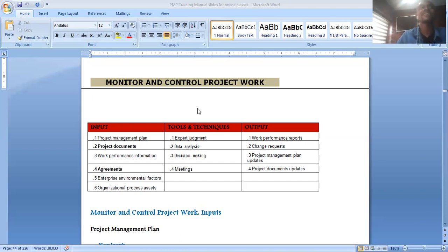You have defined that. You know that you have them in place. There are certain changes you have told your civil engineer that he can make because of the budget required. If it is maybe $5 change, $500 changes, and maybe 2 hours, you have it there written that he can make it. No spotlight changes.